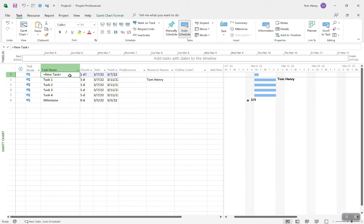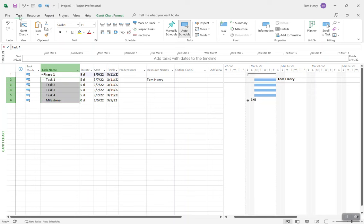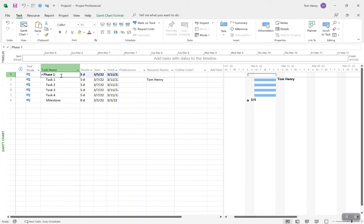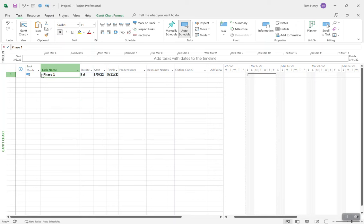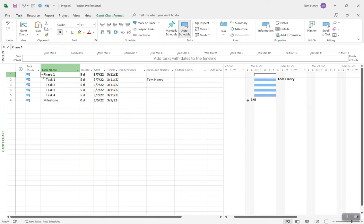Everything in Microsoft Project has a tooltip, so if you're not sure, hover over it. Phase 1 becomes bold, and the tasks beneath it roll up. My styling preference is to out-dent milestones so they appear at the same level as the summary task — that way you can collapse and see just the milestone. So we've got our tasks. We would link those tasks — I have a full video on how to link tasks in Microsoft Project, and I'd recommend you take a look.